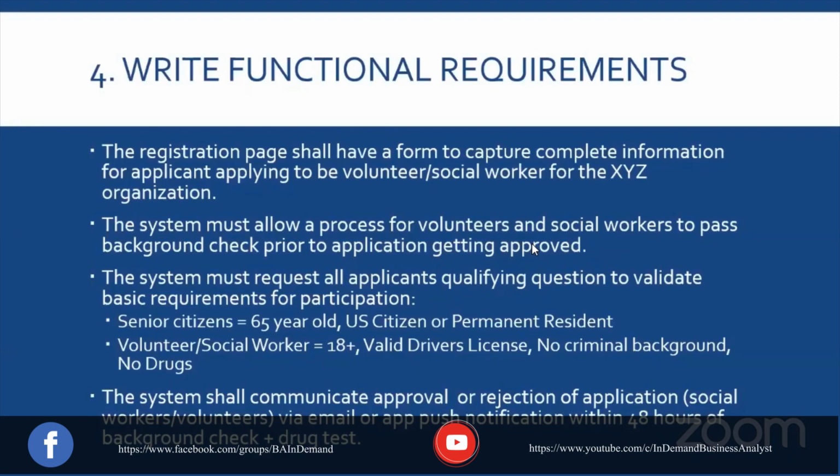And the acceptance criteria would define what that background check process might look like. So when a developer develops something, he can look at the acceptance criteria, where if he has an arrest record, he'll be denied. So they can do a very quick unit test and understand whether the piece of code they've written is actually working or not. And that's the purpose of acceptance criteria and use cases that are derived from user stories. Okay, got it. Thanks.